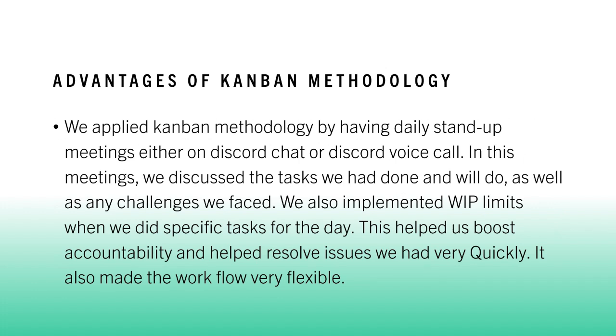Advantages of Kanban methodology. We applied Kanban methodology by having daily stand-up meetings either on Discord chat or Discord voice call. In these daily meetings, we discussed the tasks we had done and will do, as well as any challenges we faced. We also implemented WIP limits when we did specific tasks for the day. This helped us boost accountability and helped resolve issues we had very quickly. It also made the workflow very flexible.